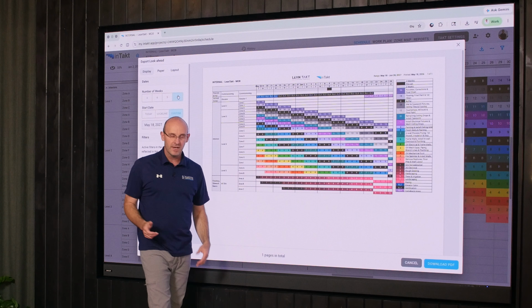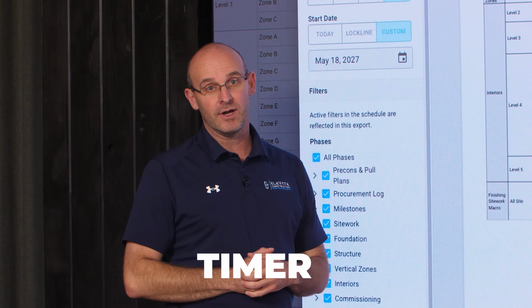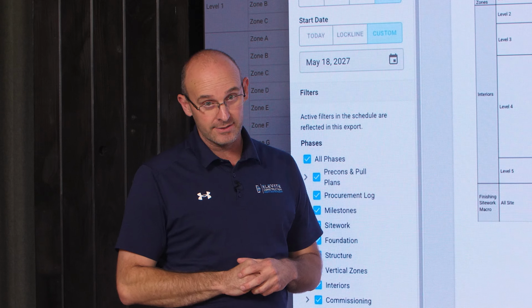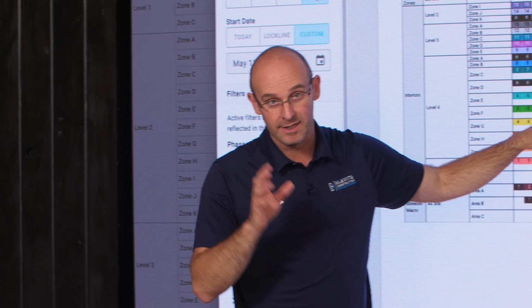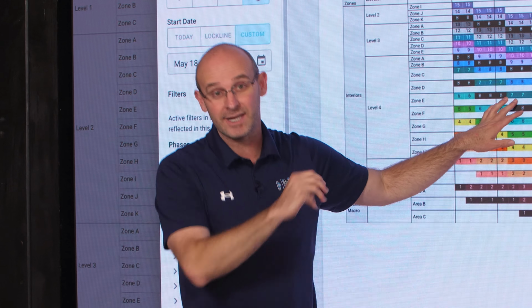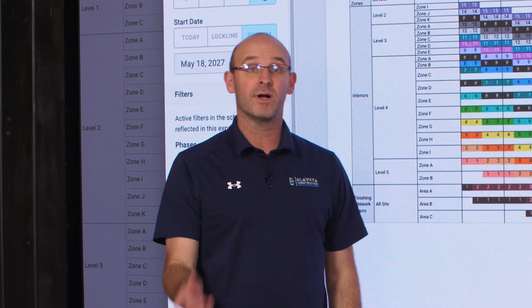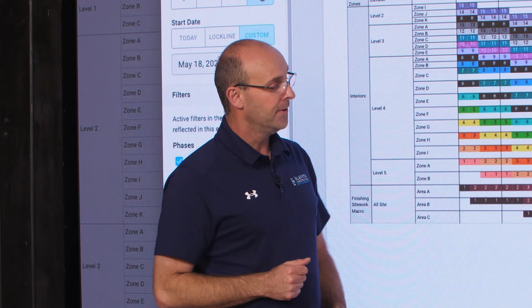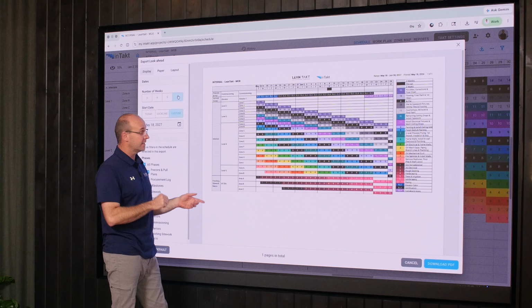Really, really cool stuff. What you do in your Trade Partner Weekly Tactical is set a timer for either 2 to 10 minutes, and you are asking your trades to look for things that are not made ready, that are not tracking to be made ready. And then what we need to do is identify that as a roadblock and add that in the production plan as a roadblock. And we can show you how to do that as well, for the purpose of resolving that roadblock before the weekly work plan. So that's the utility of this plan.